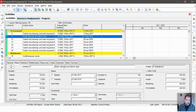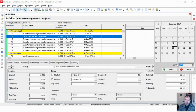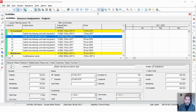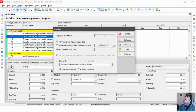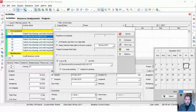If you do not have the time shown and you opt to set a start date on an activity, in the current version it's grayed out and you can't make changes to it at all. But in the new version 21, it's no longer grayed out and it actually displays the time accordingly. It's a small fix, but it's going to help give some visibility on these issues. Even in the data date box when you set your data date, that time will now show up even though you don't have user preferences set.